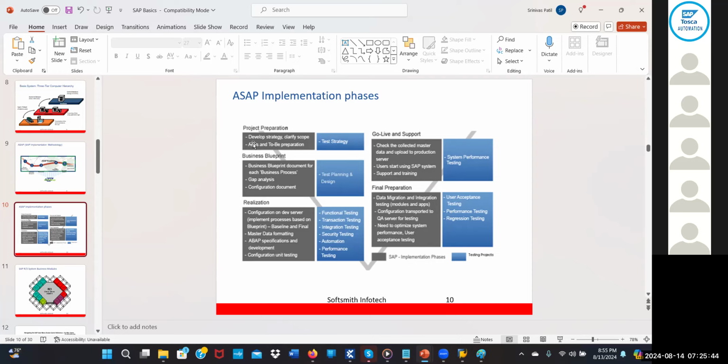Based upon these as is and to be documents, they're going to prepare the test strategies. How many requirements come, how many resources they need, how many SMEs they need, BAs they need. All of this they will prepare in the test strategy, and what environments they need, what the entry criteria and exit criteria are, and what timelines are needed. All these will be aligned.